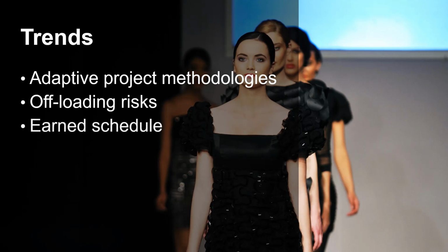You have heard a little about earned value management, and you will hear a lot more about it during the lessons on project cost management. One area which is gaining traction is called earned schedule. This is a different way of looking at schedule variances that is not expressed in dollar amounts as it is done in classical earned value. Of course, as trends are rather trendy, new ones can creep up at any time.